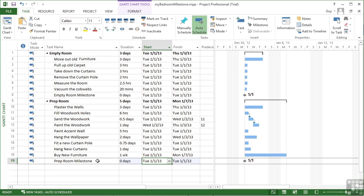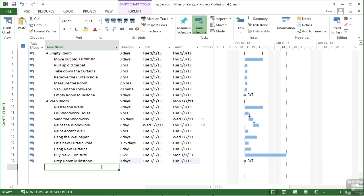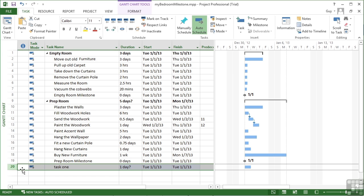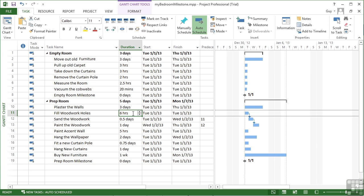Now another type of task is an estimated task. You will have noticed that when you add a new task — let's just put one in as an example — the default duration is one day with a question mark. That question mark means the duration is estimated. If we want to add our own estimated durations, we simply add a question mark. Let's delete task 20.